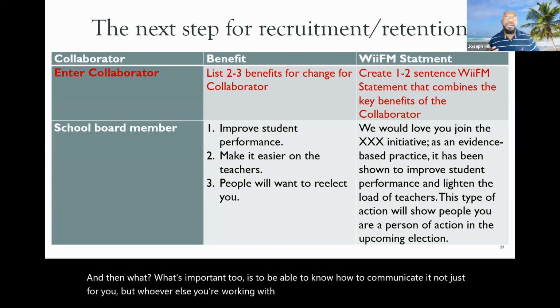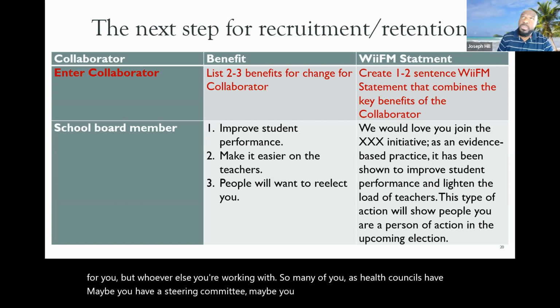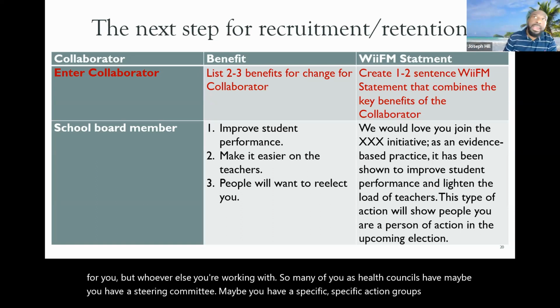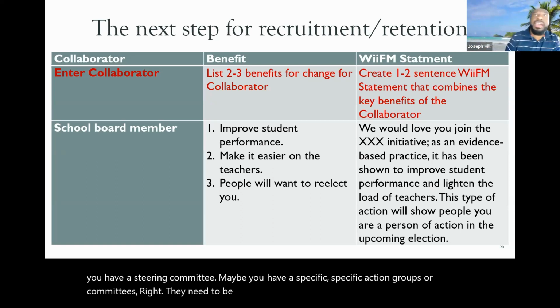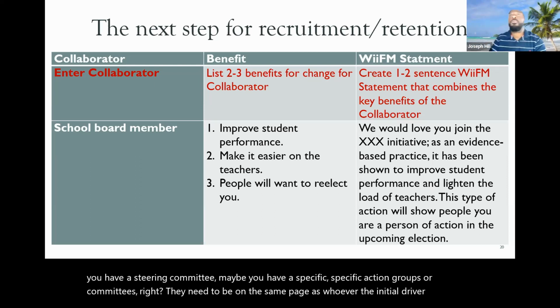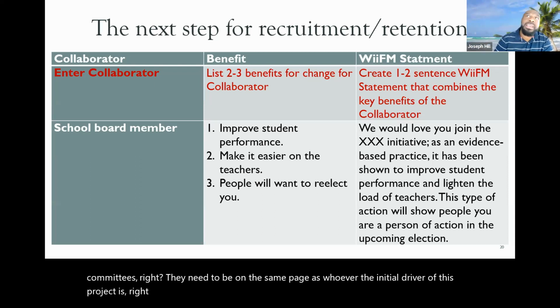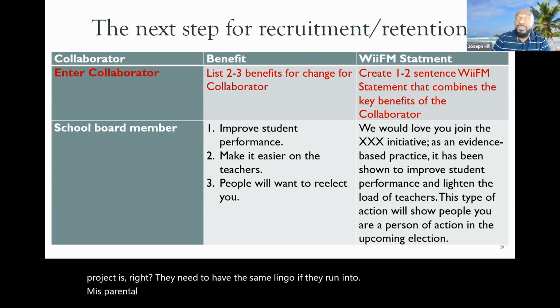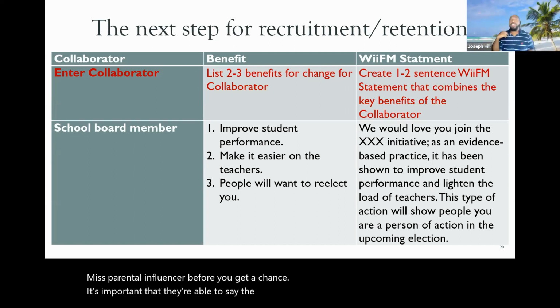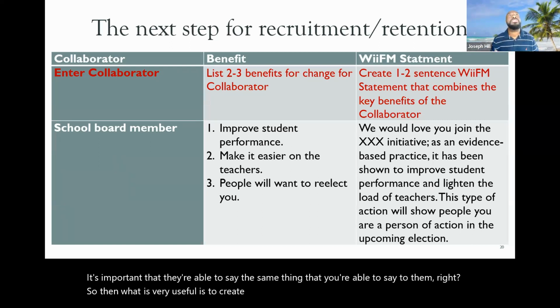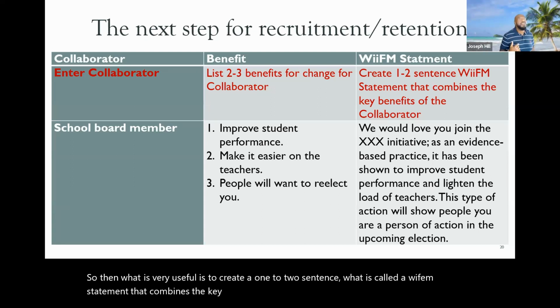So many of you as health councils maybe have a steering committee, maybe you have specific action groups or committees, right? They need to be on the same page as whoever the initial driver of this project is. They need to have the same lingo. If they run into Miss Parental Influencer before you get a chance, it's important that they're able to say the same thing that you're able to say to them, right? So then what is very useful is to create a 1 to 2 sentence, what is called a WIFM statement that combines the key benefits of the collaborator.